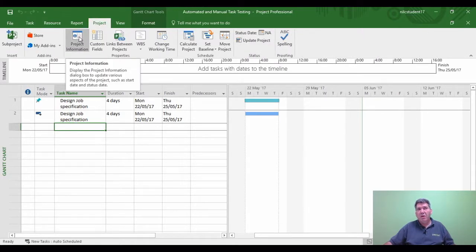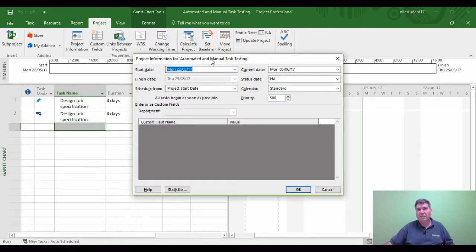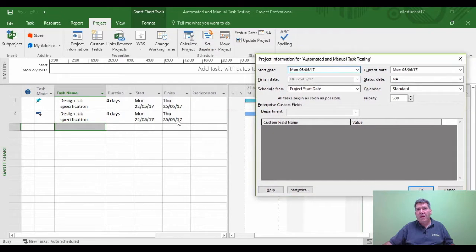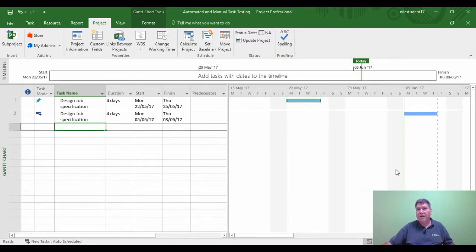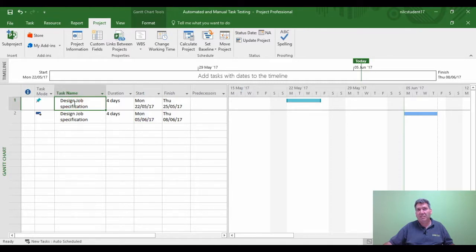I'll go to the Project tab, then Project Information, which is where we set the project start date. If I change the project start date to the 5th of June — the automated task's start date automatically came from the project start date. Now I've changed it to the 5th of June, so the automated task is going to be affected and will move out accordingly. And there we go — the automated task has now moved out to the 5th of June, whereas the manual schedule task has remained in place.